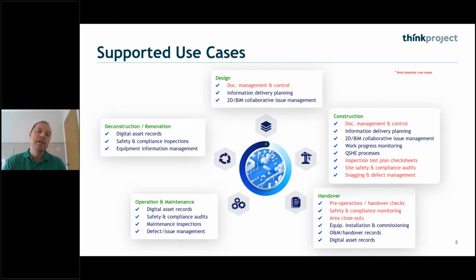But today's focus will be very much around that handover piece, the back end of construction, because we're conscious that it's not just a very defined point in time where all of a sudden we're in handover. We like to work with our clients around progressive handover delivery, so that they can ensure that they're receiving the relevant information that is going to become useful to them, that they need and urgently require to be able to operate and maintain, or even maybe sell that particular asset as well. So today's focus will be spanning that construction into handover phase, as you can see there.